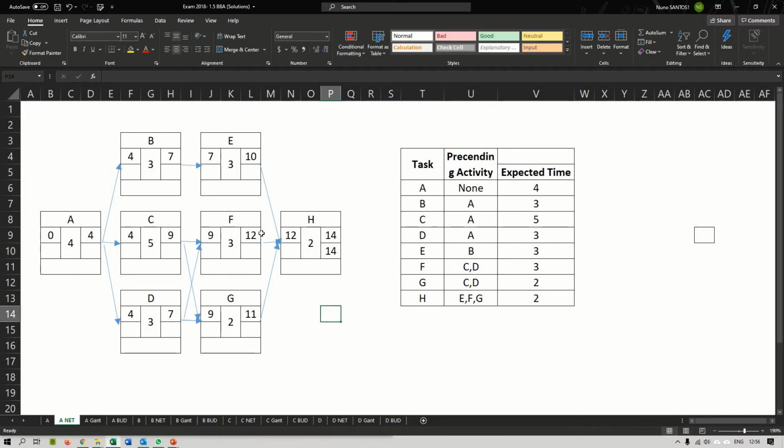In other words, when you are on the very last task, you just copy your early finish down to be your late finish. And now we're gonna move backwards. It's just a different way. So it's just gonna be two main differences. Instead of adding, we're gonna subtract. So 14 minus 2 will become a 12 for the latest day I can start this task.